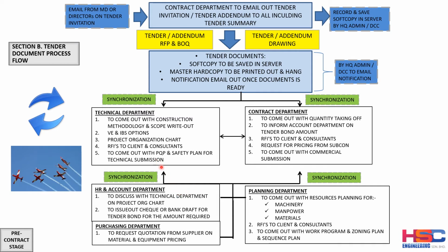then the technical department has to inform HR, and HR needs to start sourcing for the staff, and the technical department needs to inform HR clearly what criteria for the staffing are needed for this project, so they can start the process of recruitment. Should they be awarded, then the HR are able to have enough time to source for the candidate.